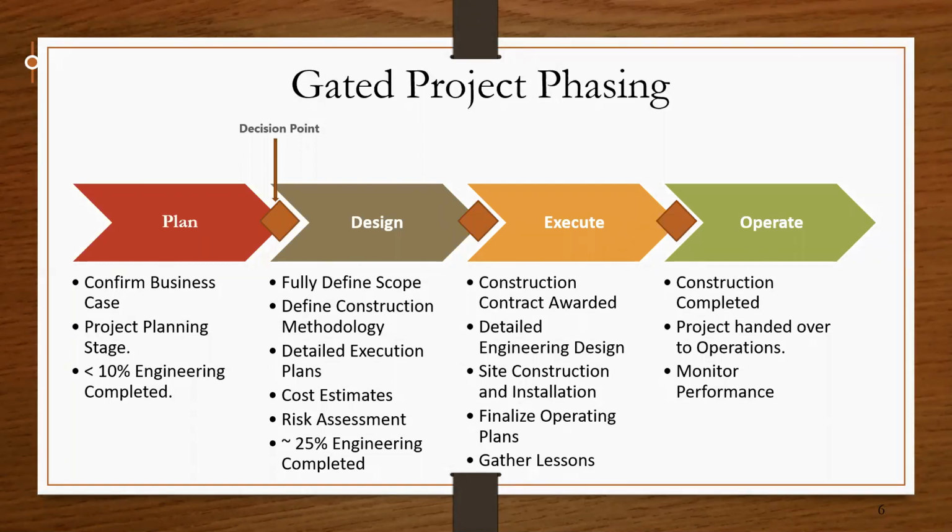Again, at the end of this stage, you go to your decision makers, put your data in front of them, and have them check to say, go ahead, do some more work, or please, this does not meet our requirements anymore, let us just can it. It's always easier to stop a project before you have expended a whole lot of money than to go ahead and spend a lot of money and find out that you have not met your objectives.